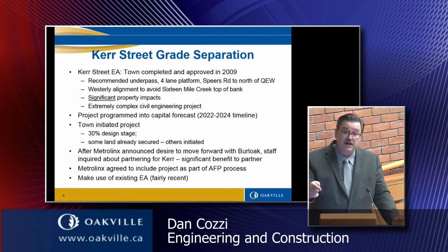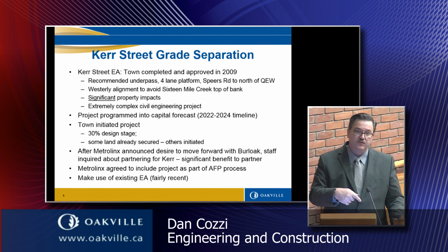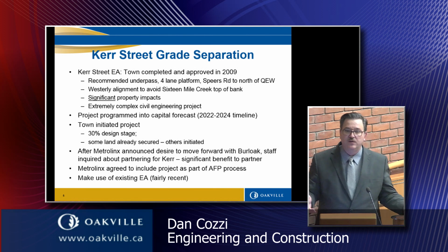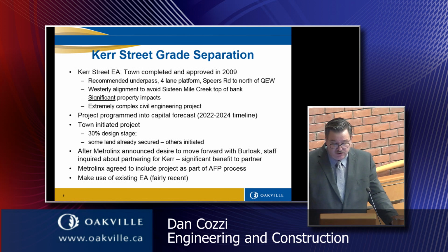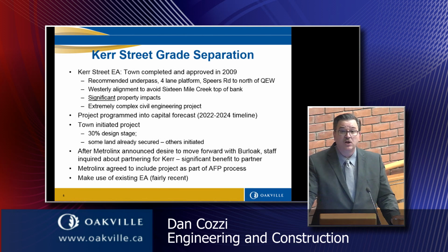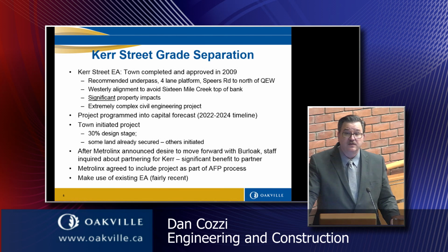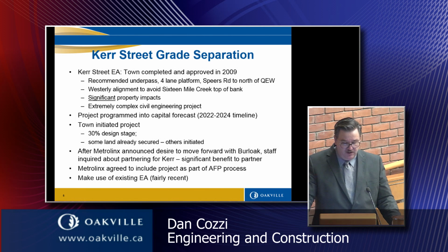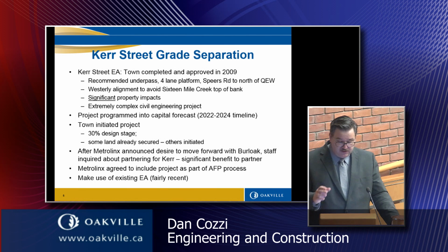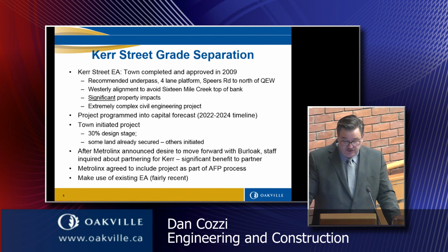I can tell you that there has been monies already in the budget from before, because we're using that to assist us with design and with land acquisition costs. The town actually acquired one large property on the east side at the corner of Shepherd several years ago. That was in anticipation of this project. We did initiate the project as a town standalone project a couple years ago, maybe 3 years ago. We've actually got it to the 30% design stage. And as I said, some of the land has already been secured and others have just been initiated.